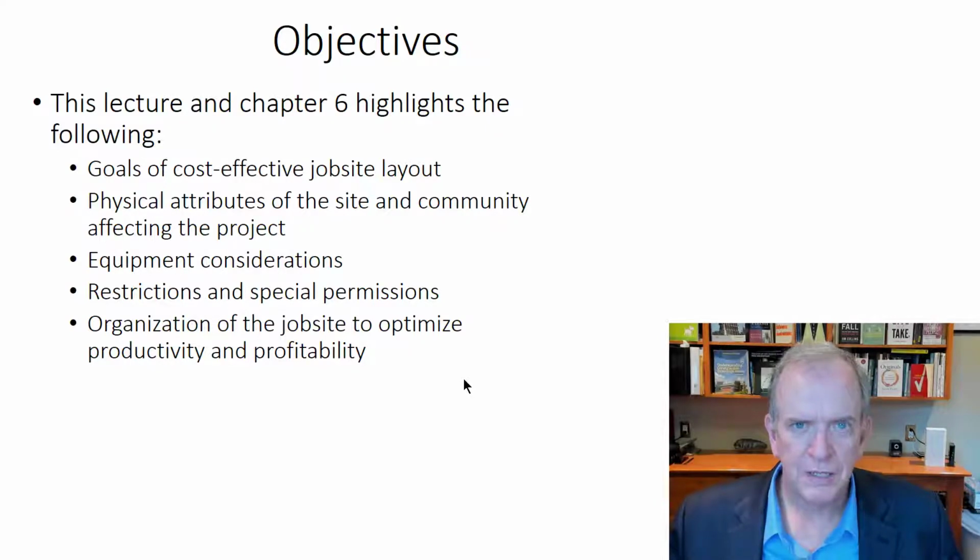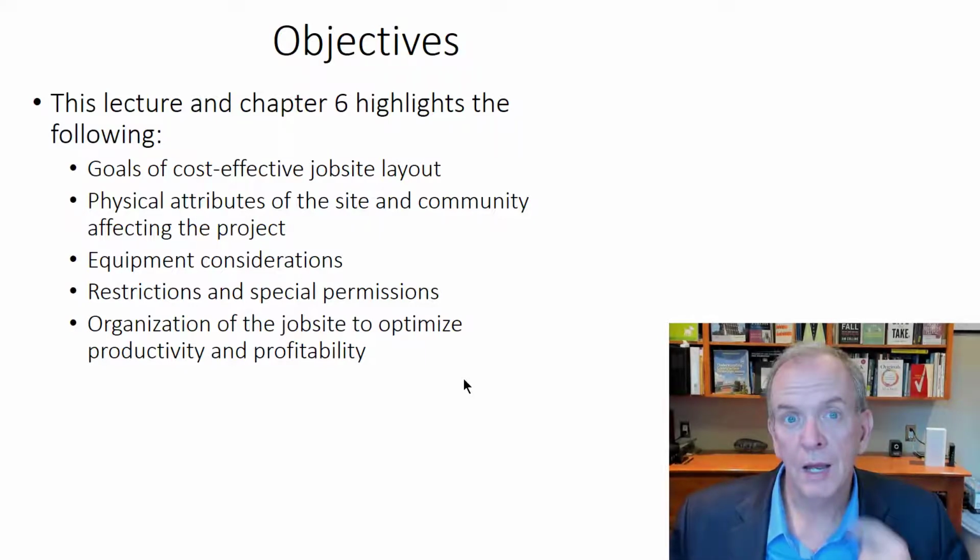They're not necessarily going to be all that responsive to your needs. So you have to be very proactive and try to get ahead of the curve in these areas. If you have a day early that you can submit a permit, you want to take advantage of that, because every day is potentially lost time if the permit doesn't get approved in a timely fashion.